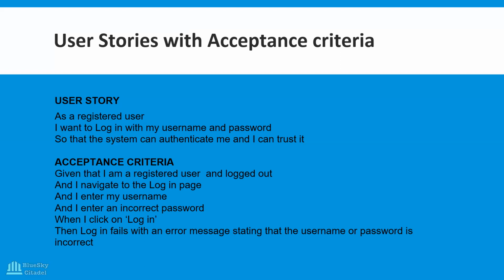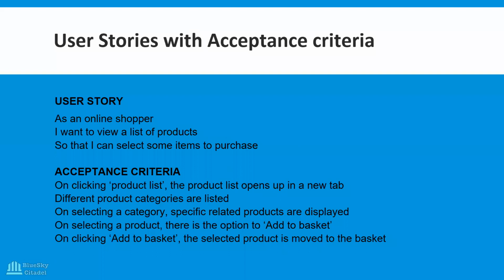Bugs are raised when there are defects, when things are responding the way they shouldn't, or when the system or process is not acting as it should. They will put the evidence there to say, I put in an incorrect password and it logged me in. So the developer will take it back into the process and go and fix the bug, fix the defect, because something has not gone correctly. Okay, so that's that.